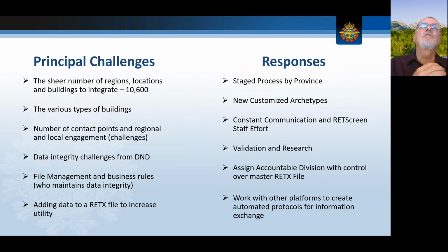So what are the biggest challenges? Well, one of the challenges is just the sheer number of the separate regions, the locations of all the buildings to integrate. That's 10,600 buildings. How did we tackle that? Well, we did it staged. We tackled it by province, by province, by province. That's just the way that we had to do it. And we've been doing it now for about 2.5 years.